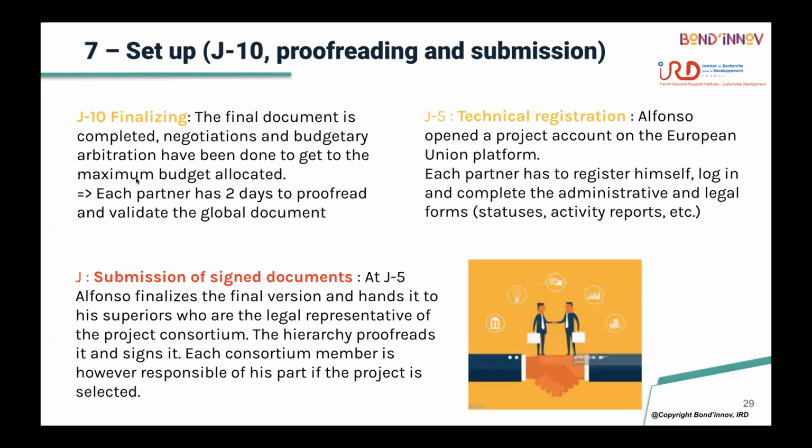From this date, each partner has 2 days to proofread and validate the global document. As you know, even if each partner provides part of the proposal regarding its contribution or its activities, each partner is also required to read all the documents, to contribute to the global proposal, and to be aware of the coherence and the interdependencies between the different activities.